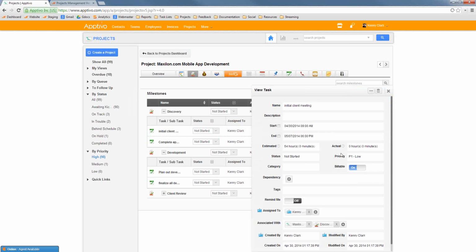And if we click on any one of these tasks, there are two key fields. One is the estimated duration. So this would be 54 hours, and this actually defaults to counting on an 8-hour work day. So based on this estimated duration, it's able to calculate the difference between the start date and the end date. Meaning I could change one of these and it would adjust my estimates and everything. But the idea is you should just focus on using your estimated dates and also your dependencies.